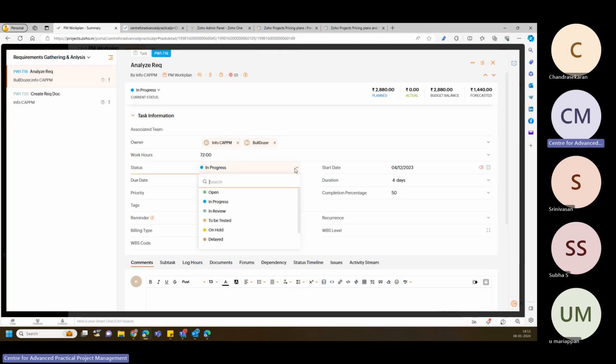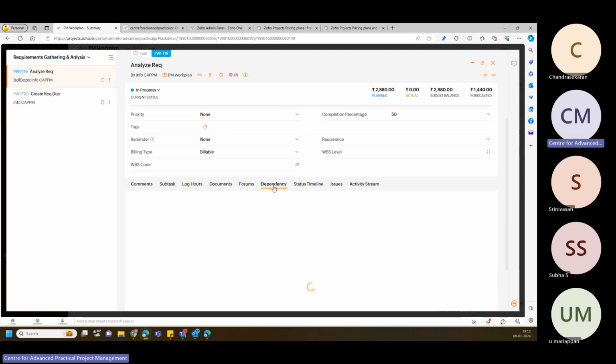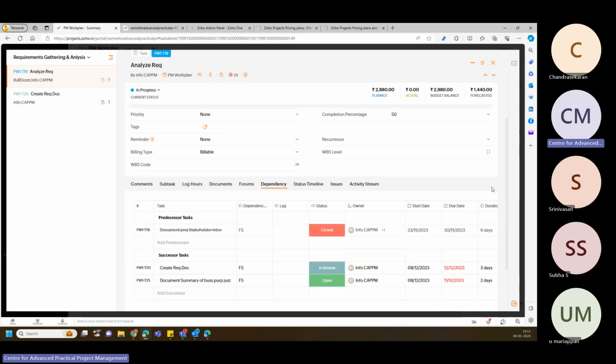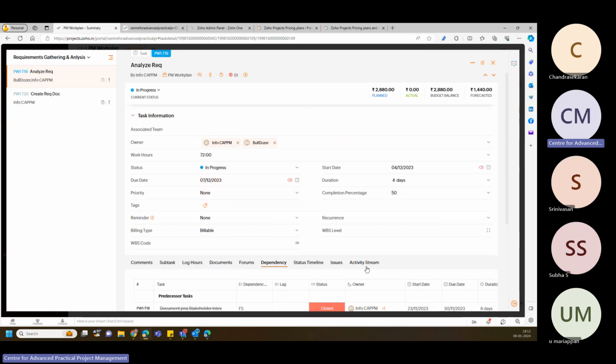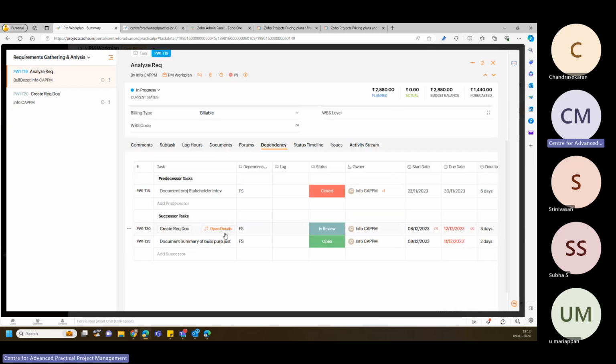So whether it is in progress, whether you started that particular task, you can give that information. And when is the start date and the due date, and you give the dependency. So accordingly, if you have given the dependency, it will automatically calculate the dates. Okay, so the predecessor successor relationship you can build, and also you can specify whether it is following a finish to start, a start to start, a finish to finish, or start to finish. So that is the four types of relationships, and whichever type of relationship you want to take, you can make use of.